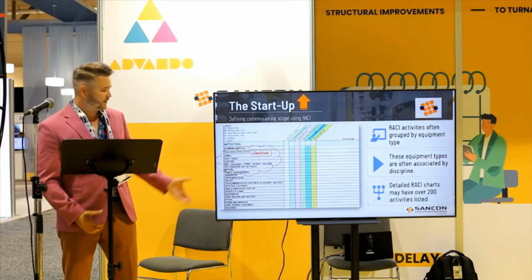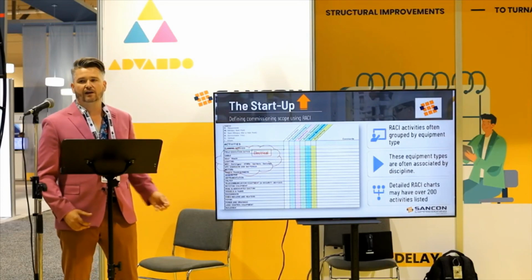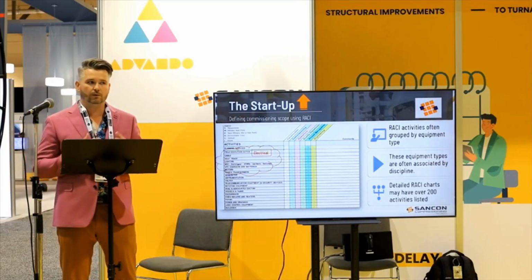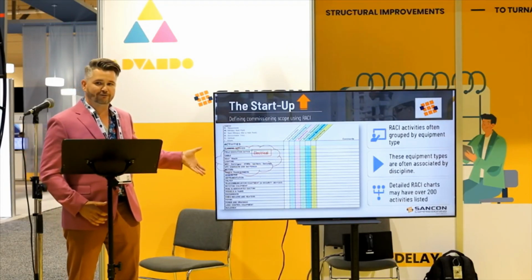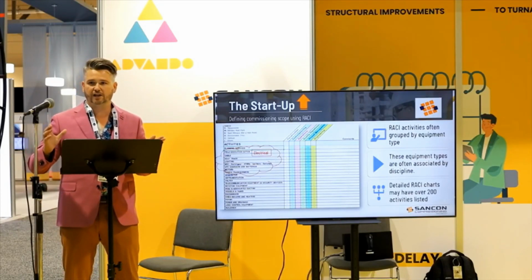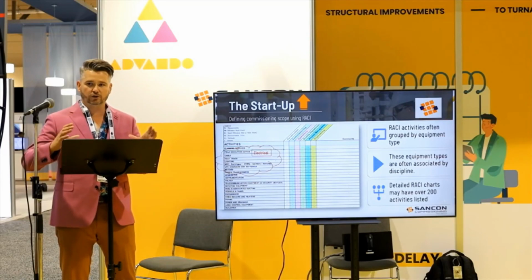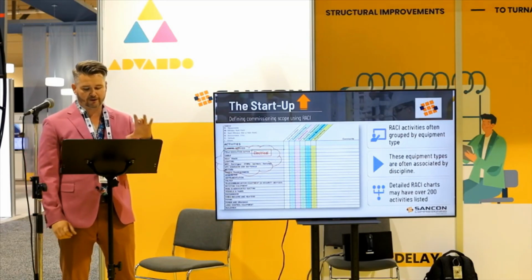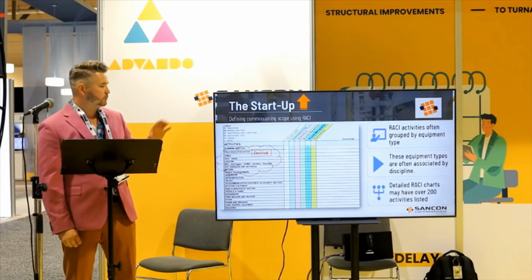So this is an editable document, and as we start building the process out, we want to build this to a very finite detail. As you can see here, it's not just commissioning as one box in a schedule that says 30 days. We're trying to define very specific groups of activities within disciplines.